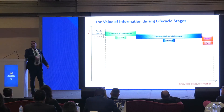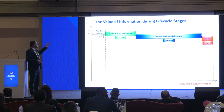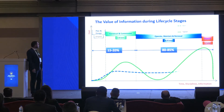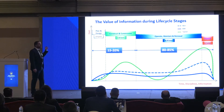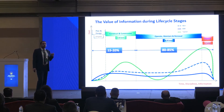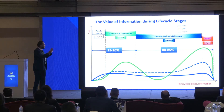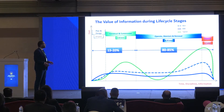Quickly I will go through the life cycle stages starting from design, construction, operation and maintenance, to see together these graphs showing the curves. Basically in the design and construction stage we are spending 15 to 20% of the life cycle duration of any project, and the remaining 80 to 85% is related to operation and maintenance.